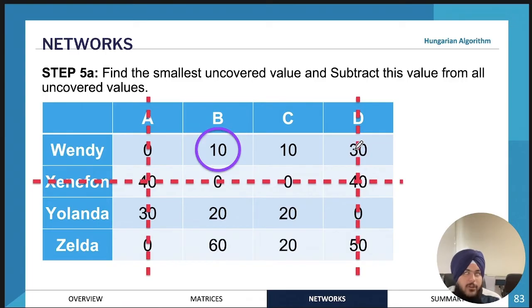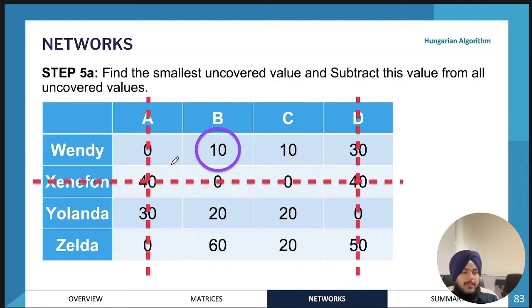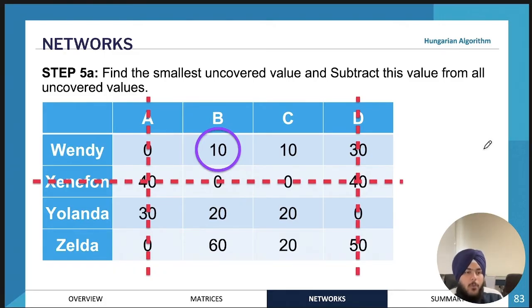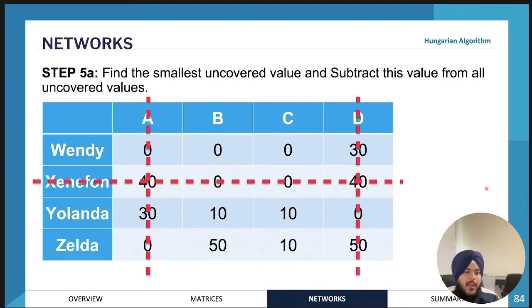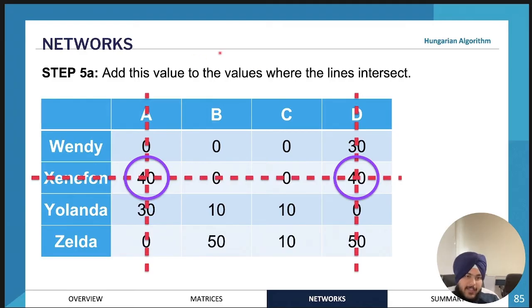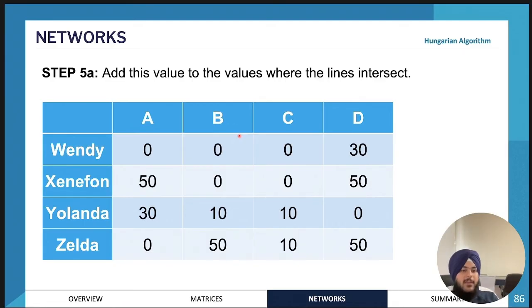The next step is to find the smallest uncovered value in the table — in this case it's 10. Subtract this value from all uncovered numbers. Regardless of how you drew your lines, whatever your uncovered numbers are, subtract 10 from all of them. Then add this value to wherever the lines intersect — so add 10 to each intersection point. After doing this, you get an updated matrix.